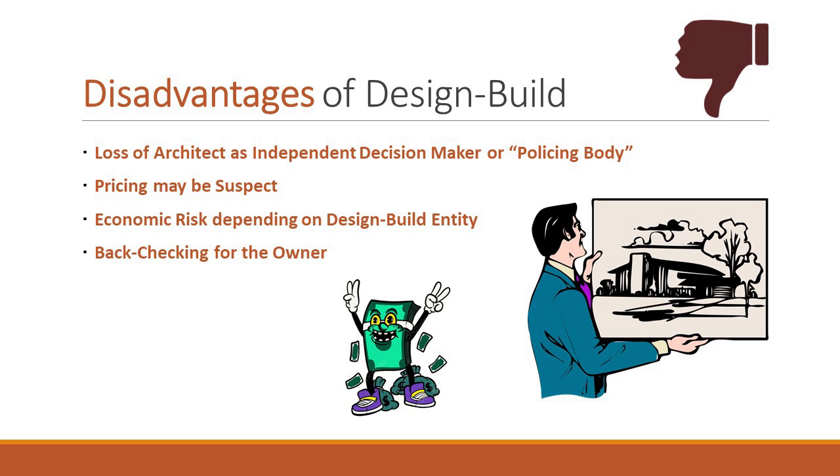And so when you have a design build, while there is this collaborative effort going on, you don't have that watchdog, and the owner, depending on the circumstances, can be taken advantage of because that independent decision maker's gone. So that's a disadvantage of design build.